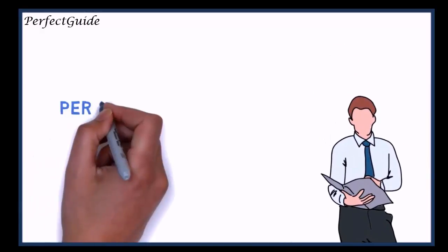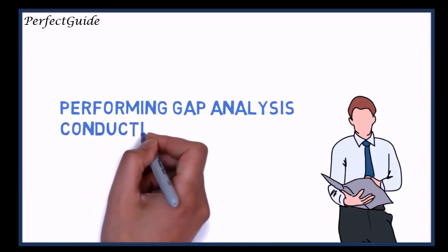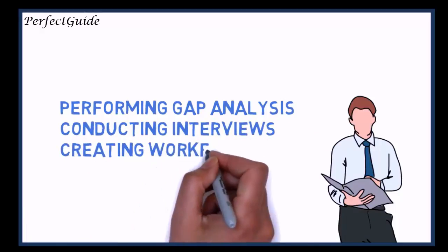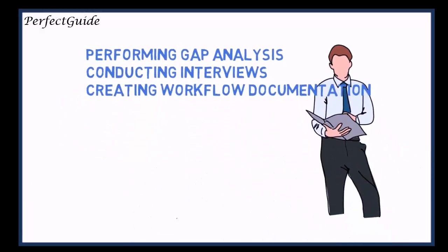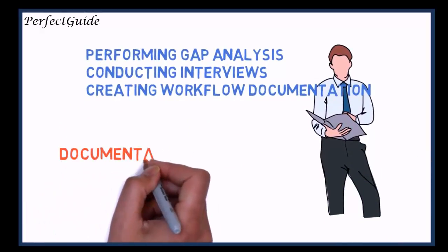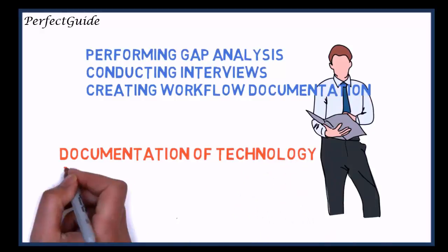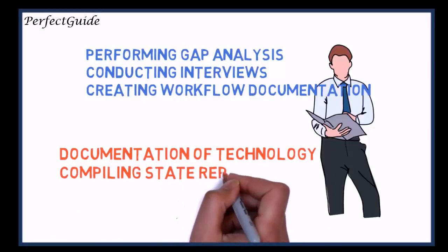Milestones and important activities of this phase include performing analysis of current state gap, conducting interview sessions with impacted end users, creation of detailed current state workflow documentation, definition and documentation of current state technology and system architecture landscape, including system interfaces, and compiling current state reports.